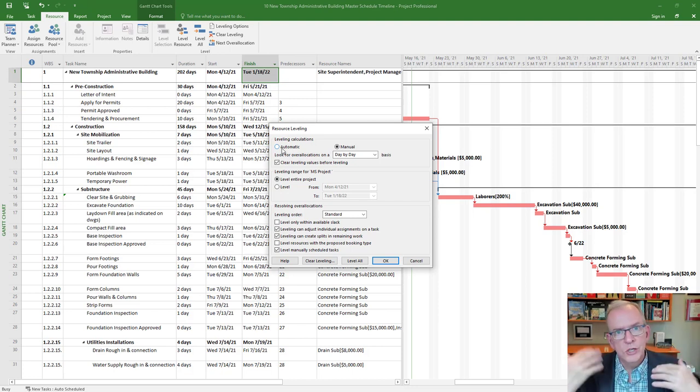You know how I changed the duration? I gave it some thought and I adjusted it. It's going to do it automatically. What a nightmare. It doesn't know what you need to do, where you need to add somebody. It has no idea. And the program will behave really strange for you. One time, when I went to a newer version of Microsoft Project, it was loaded in our computer labs and I guess in the options had it set up for automatic. I couldn't understand why it was moving things around and making me crazy, till I figured out that they had it preset on automatic.